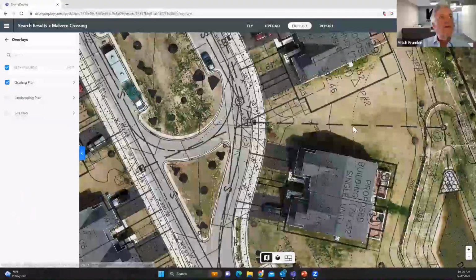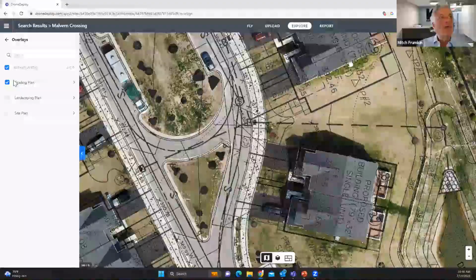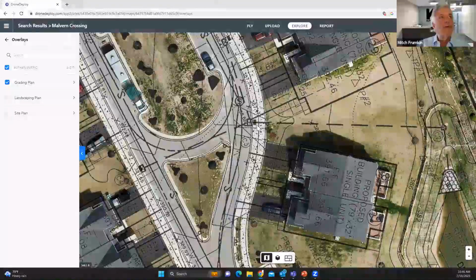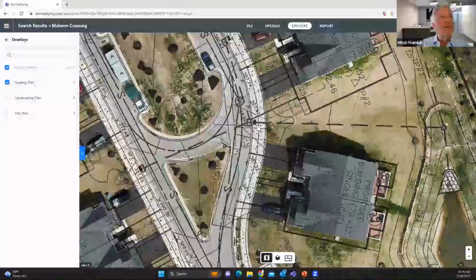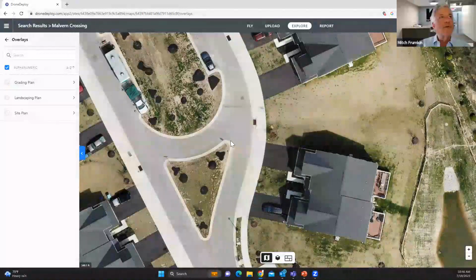that when you do a transition study, we walk the entire site and look at everything. We can also use thermographic or infrared cameras on the drones, where we can see if there's water under the shingles. We can also see if the ventilation in the roofs is working by the infrared cameras, because it tells if the heat is coming out of the attics.